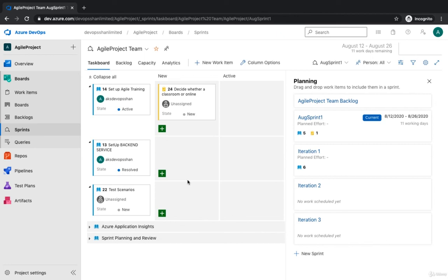and capacitize your work items, or whatever work item you want to complete within a defined sprint. Generally you start off a sprint with a sprint planning. In the sprint planning you get down with all the developers, infrastructure and testers, and obviously the clients or the product owners, and decide which features or stories are relevant for this particular sprint based on the business need. You start pulling them from the backlog into the current sprint and you time box them.